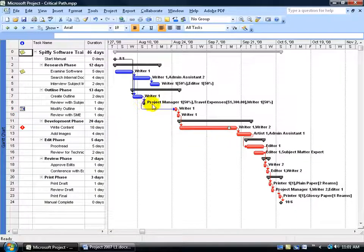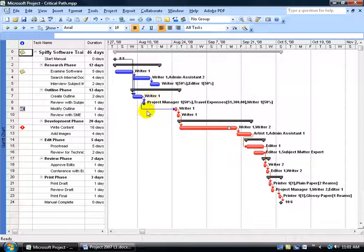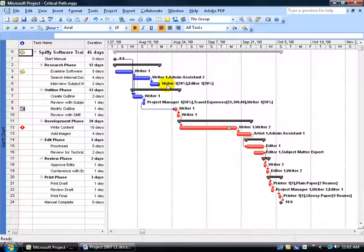So I've got this task that can delay and push out a little bit until its successor hits the 25th. If I go from the 25th or beyond, it's going to affect that task and domino down. This will be turned red because it becomes a critical path — we have no lag or delay time here. These non-critical paths can quickly become critical paths if we put enough delay time on there to push out the project's due date of October 6th.